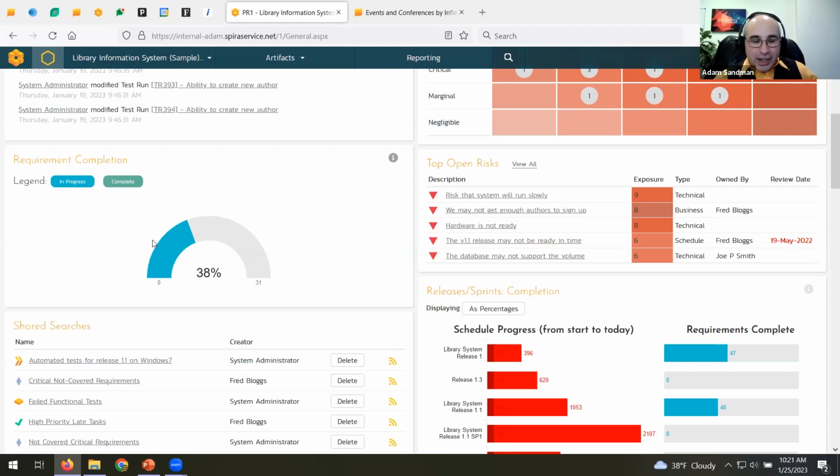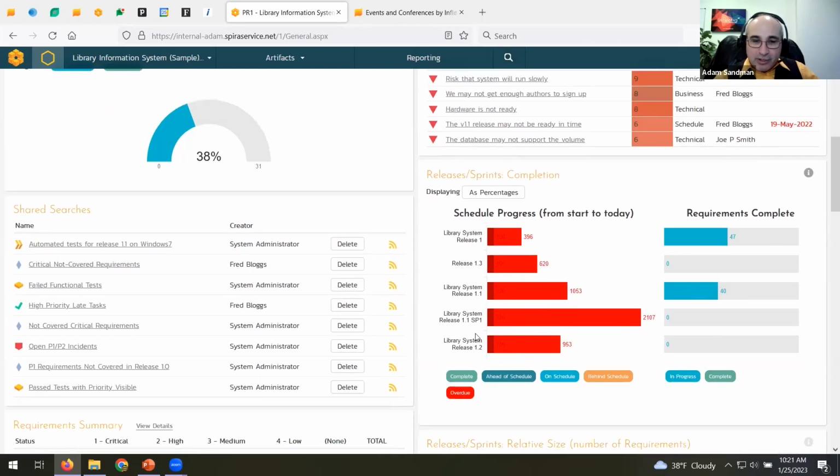So you can see here, that's our percentage done. And what we mean by done is, if I look at these active releases and active sprints, are the requirements in each of these active releases and sprints done? So it doesn't matter about things that are completed. If we finish the release and it's closed out, that's not included. If it's stuff that's planned in the future, not active, again, that's not included. It's of the active work, what percentage is done? And you can then drill that down by release and see, well, is that release behind or on track?